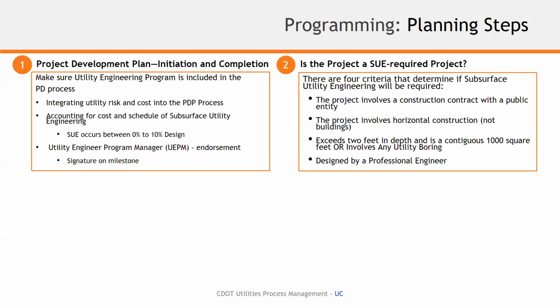And then, is the project overall designed by and stamped by a professional engineer? It's critical that all 4 of these criteria are reviewed, and you have to put a check by each and every one of them. And if you do, then a SUE required project by state statute is initiated and required.